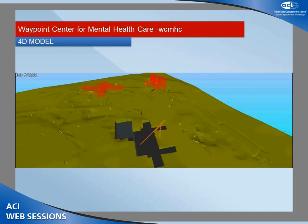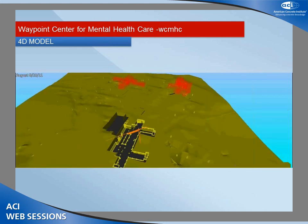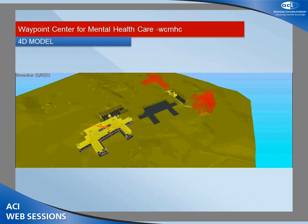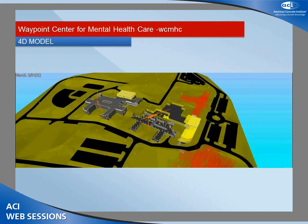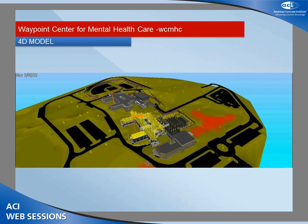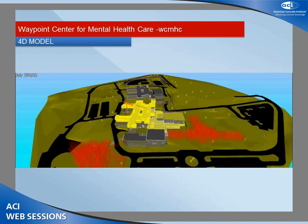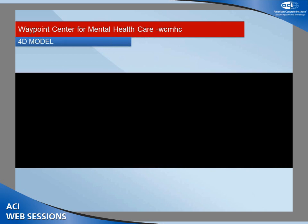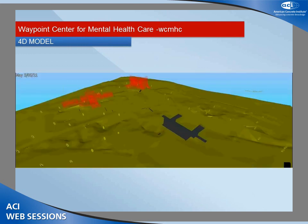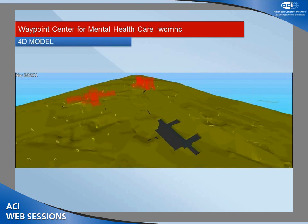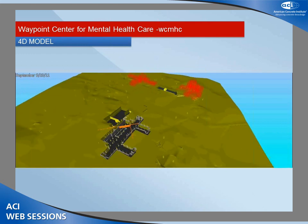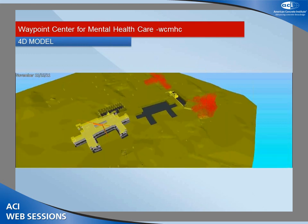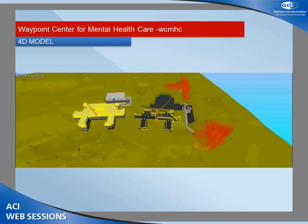The total budget was about $474 million, targeting LEED Gold, and the structure was mostly structural steel, concrete foundations. We also produced a 4D model showing the overall phasing of the project. Once we collect all these 3D models at the end of or during the design process, we can take the Primavera schedule and link each activity to its associated geometry in Navisworks, then run a simulation of the project schedule. This is very useful for explaining to all parties what they're going to do, how, and when. We're not maintaining those models through construction, but creating them at the beginning to illustrate overall phasing.